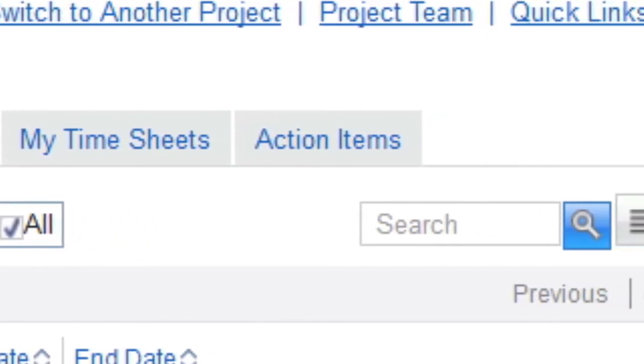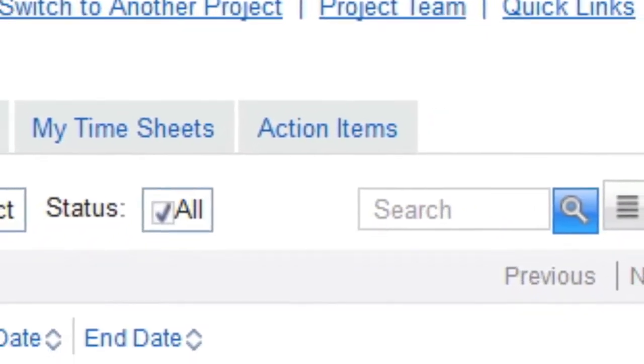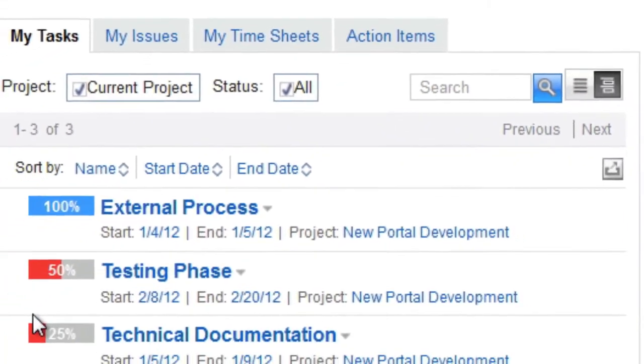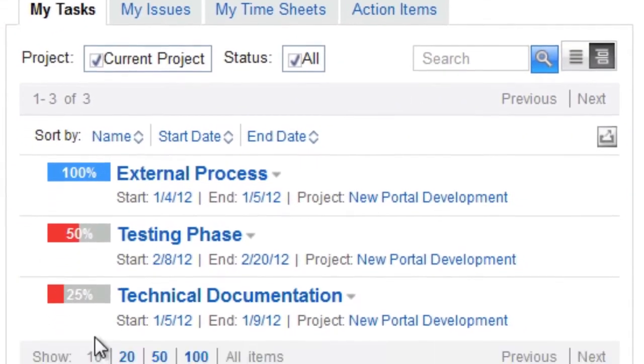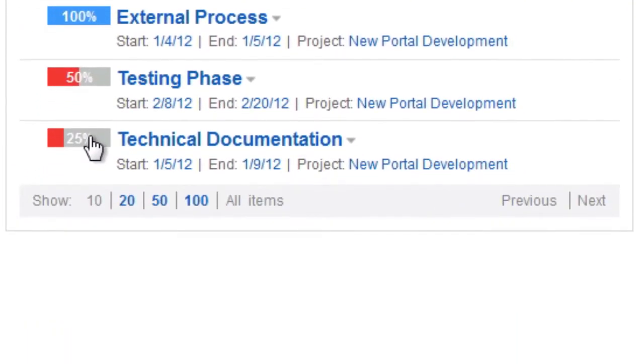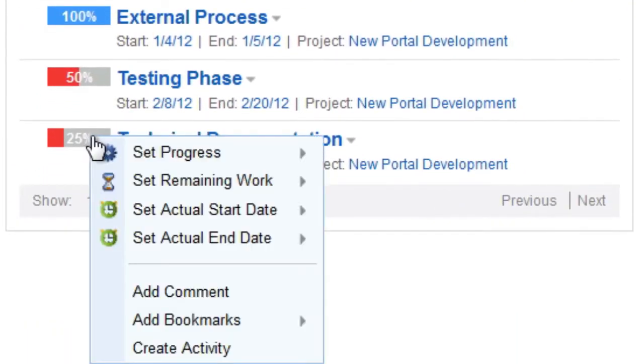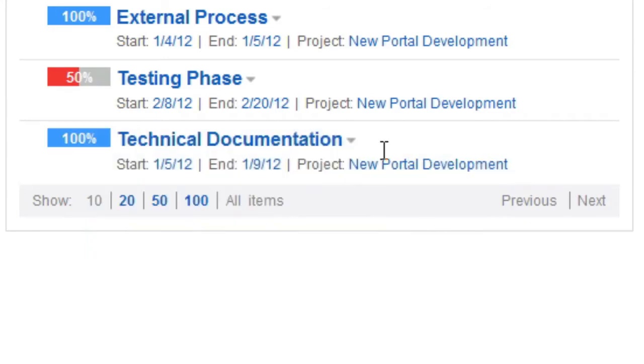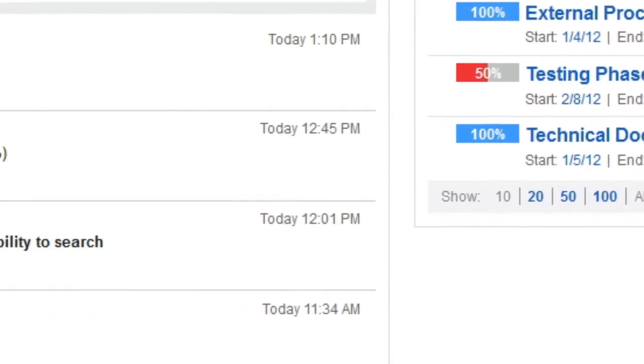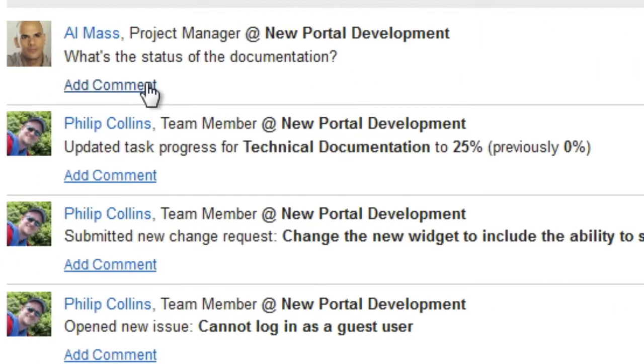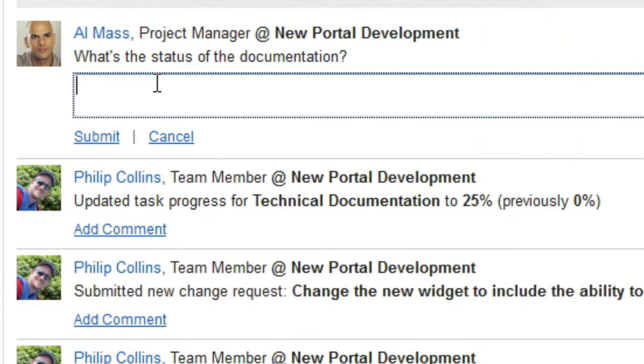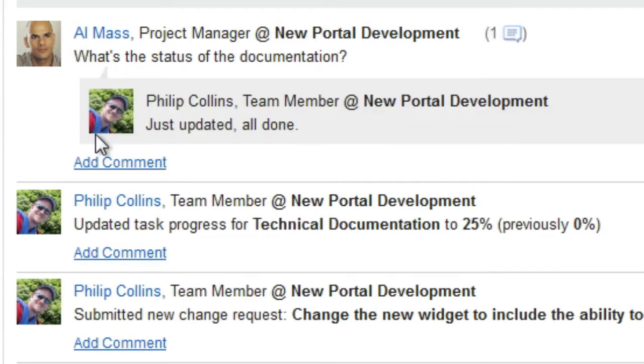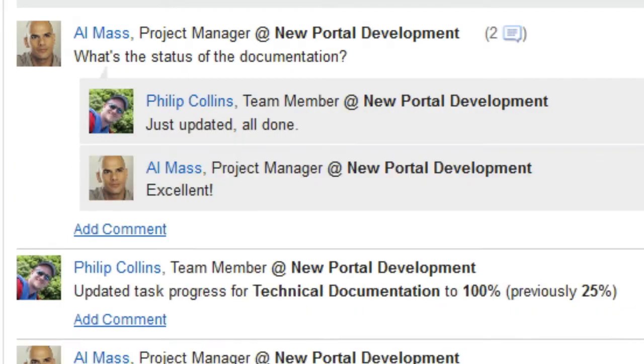A user can update status on project tasks from the Personal Dashboard. Here, Phil changes the status of his task from 25% to 100%. Once he does this, the project team is notified via the wall, the project plan is updated accordingly, and all project and portfolio reports reflect the change.